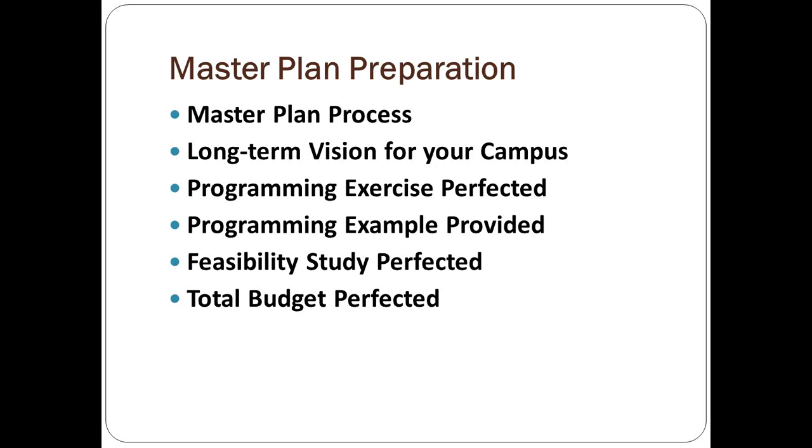And so we're collecting all of this information that we can collect as a church to be able to give it to qualified industry professionals who can serve us well, because we've given them the right information and clear direction as to what we want. And then they're going to help and bring their expertise to the table. But we do want to have some idea of a total budget and perfect it so it's not pie in the sky, or we're talking in a way that the industry professional is going, you think you can build that for $25 a square foot? It's going to cost $125 a square foot.